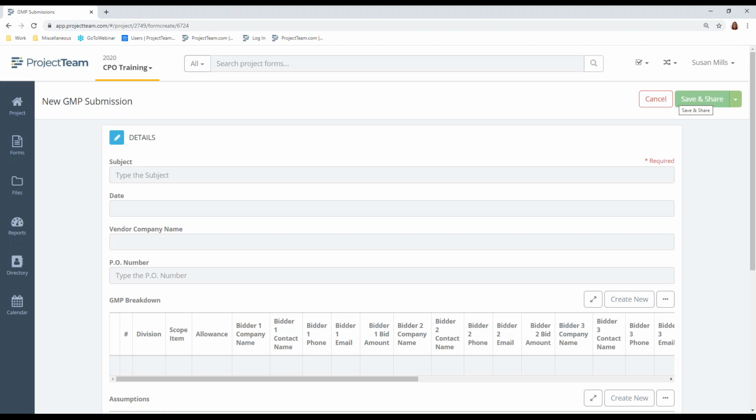This includes bid records of all the bids obtained for each cost line item with contact info and the final proposed cost. It is submitted by the general contractor to the DGS PM.